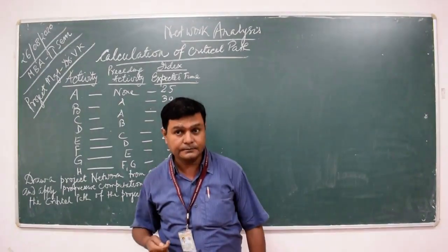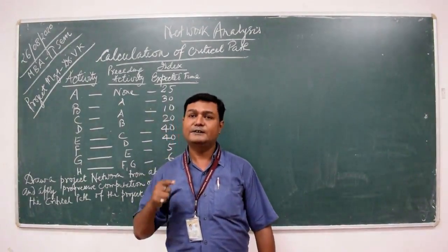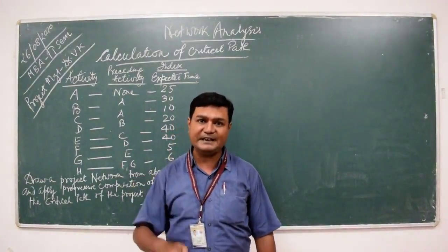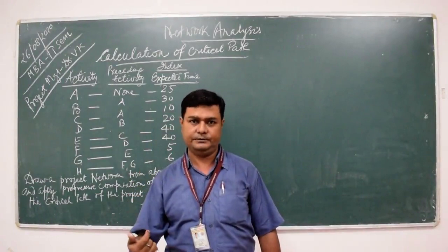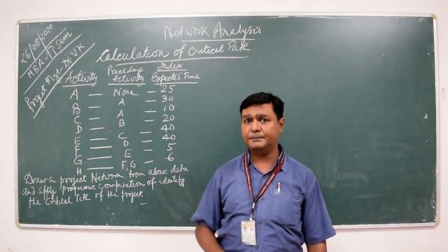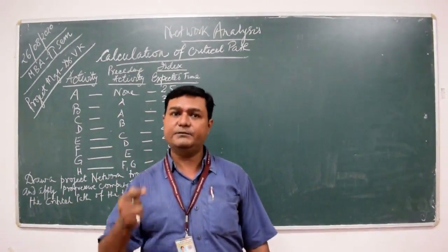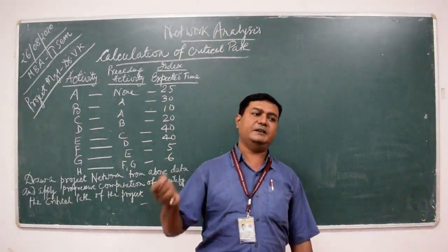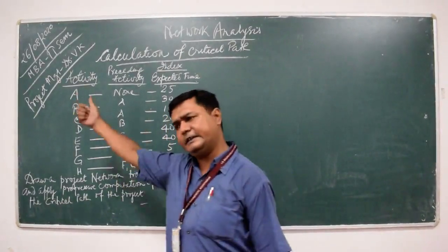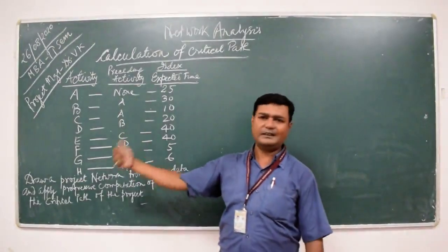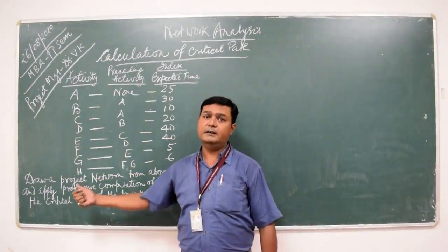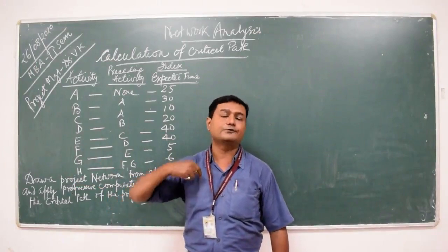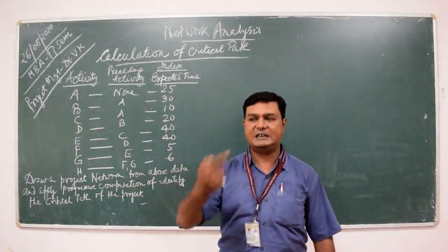It means there is no independent identity of an activity without an event. So if the information about the event is not given in the data, following the rule, we have to create the events from our side.